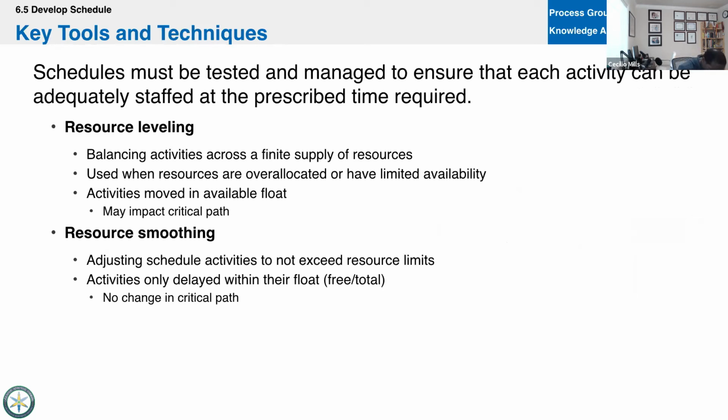What I want you to remember for the exam is that leveling does not care about the schedule. It will push the schedule. And smoothing will not.